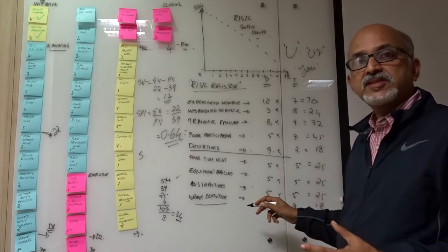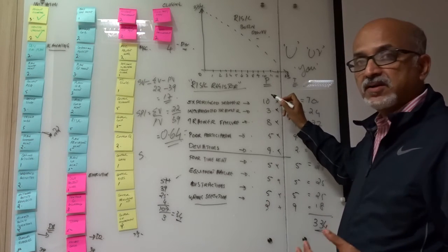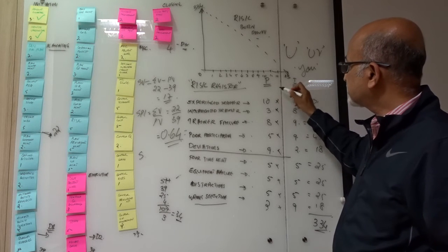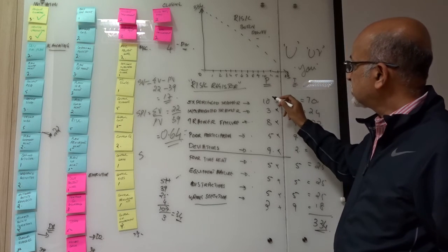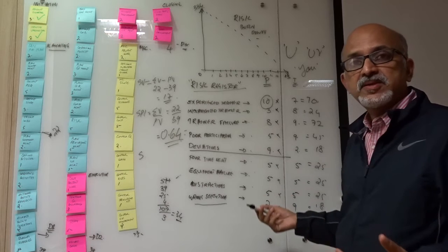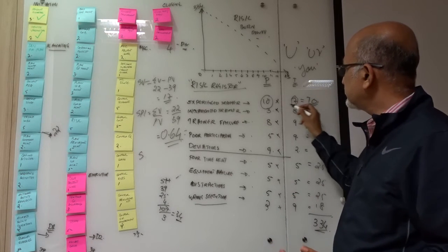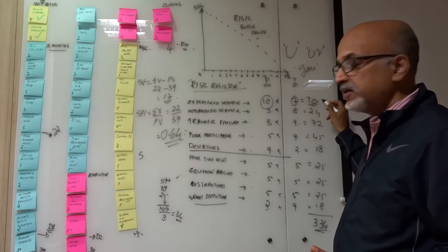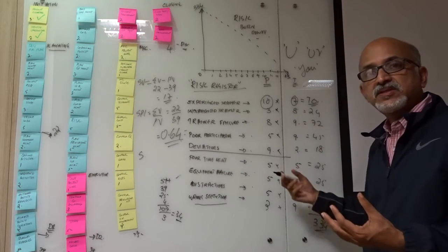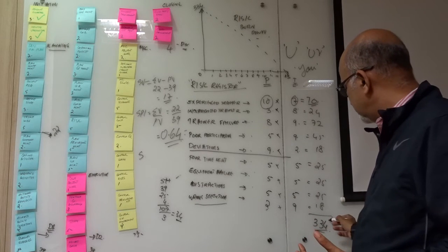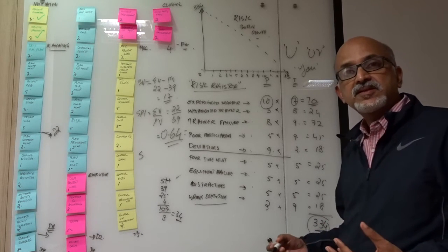For each of these risks, we did a qualitative risk analysis. That means on the probability and impact scale, we ranked them. I'm an experienced trainer, so probability is 10 out of 10, and the impact could be 7, and put together P into I is 70. Likewise, we did this probability into impact for all the risks associated with this training, and cumulatively we got 334.